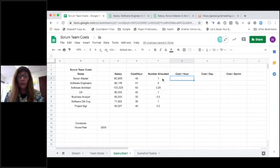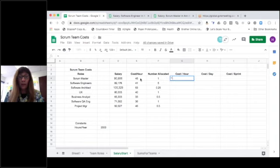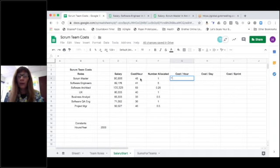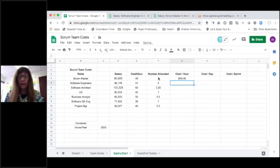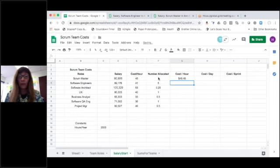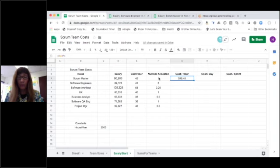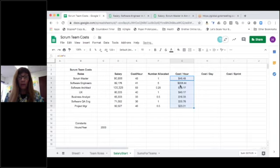All right, and so now we'd like to calculate the cost per hour for that role. So I'm going to start with, and that should be for the number of roles that we have on the team. So let's take that cost per hour multiplied by how many we have allocated. It's the same for the one Scrum Master, but you'll see that change for the software engineers.